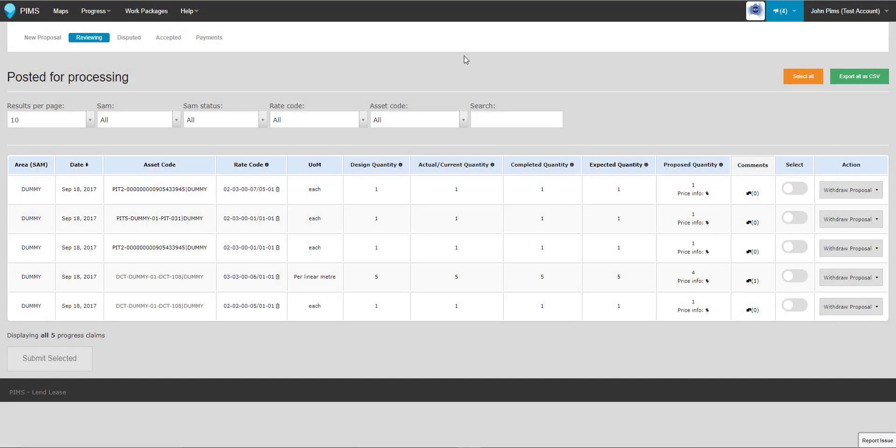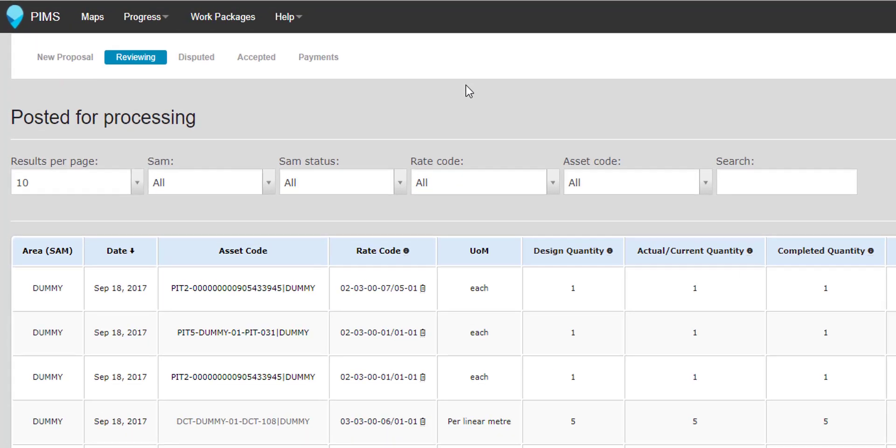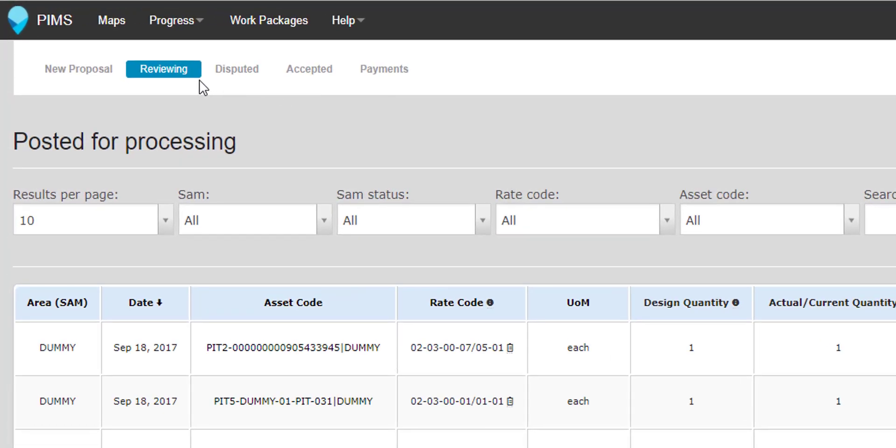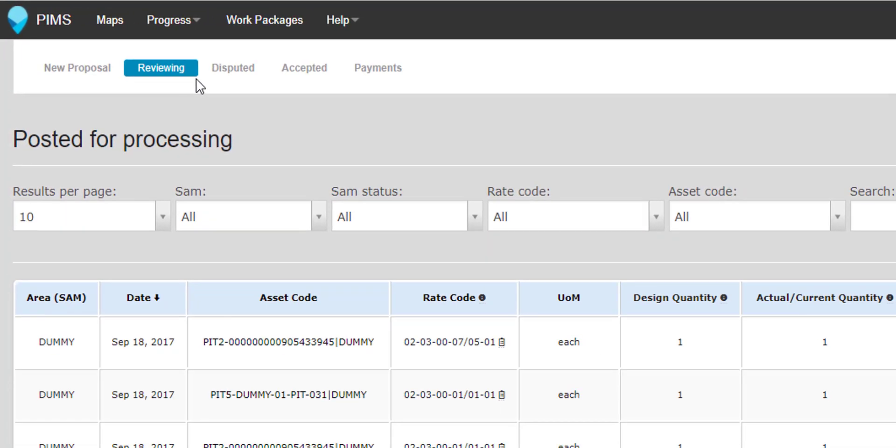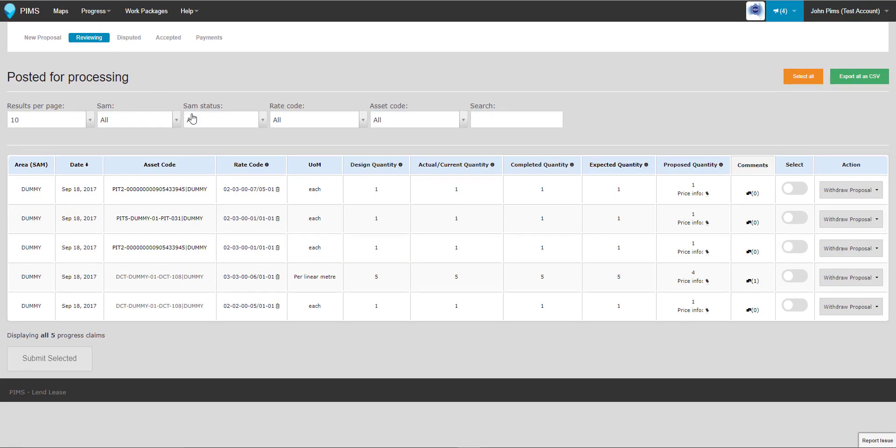Once you've submitted your progress proposal, it will be moved to the Reviewing status. Proposals awaiting Lendlease Review are locked and finalized, and no further changes can be made.